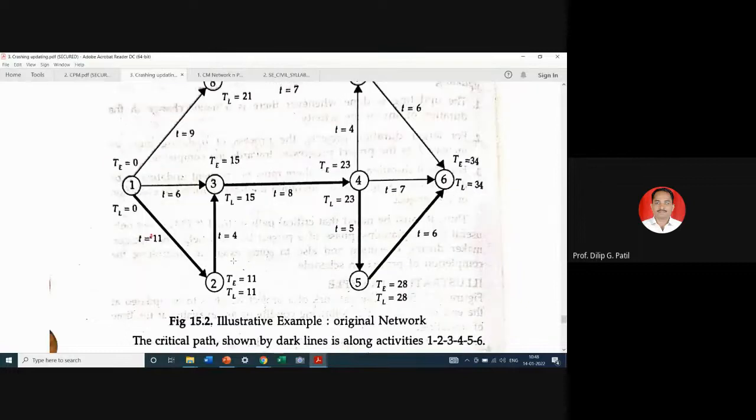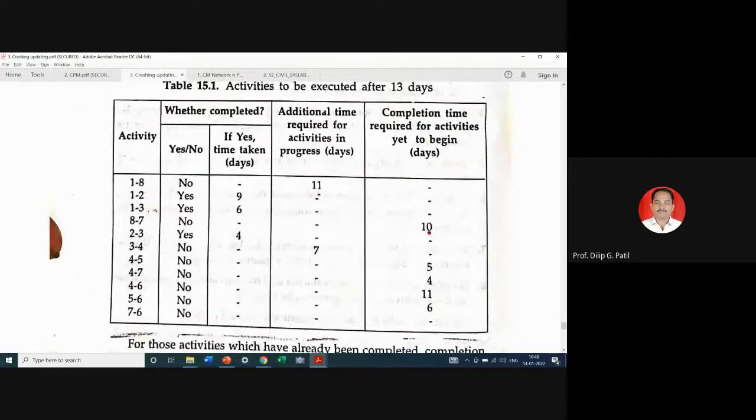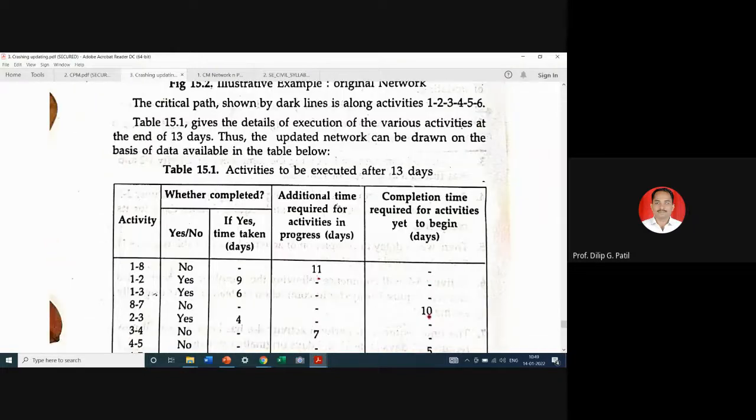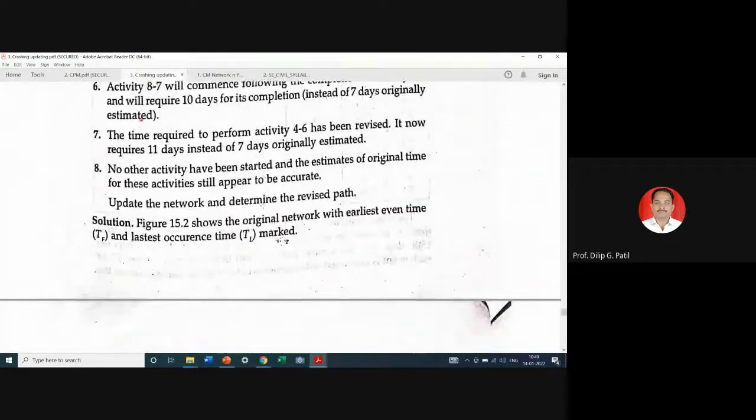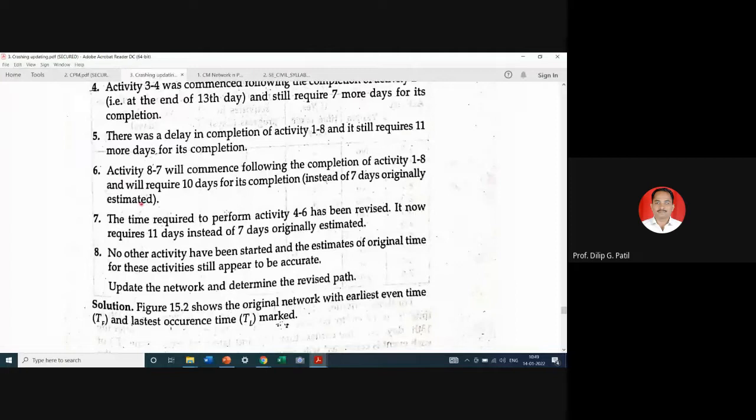And accordingly we will analyze it in form of this table. ओके, हा टेबल कसा बनवायचा वगैरे आपण बघूयात आणि त्याच्यावरून मग तुम्हाला पुढचा प्रोजेक्ट ड्युरेशन किंवा क्रिटिकल पाथ कसा डिसाइड करायचा ते आपण बघूया. We will just go through all the conditions given and accordingly we will then classify all these conditions into 3 categories as completed activity, ongoing activity and activities which are to be started.